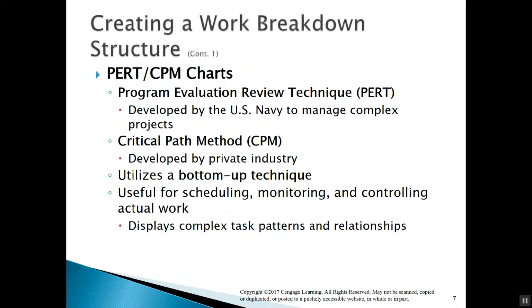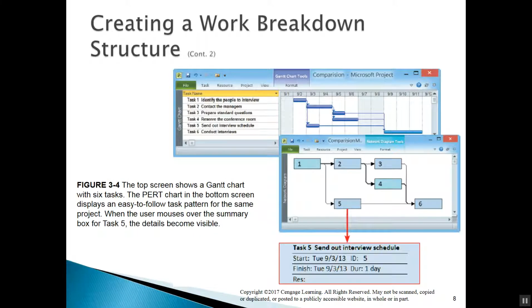Now, things on that critical path, if we shorten the duration of those items, we can shorten the duration of the project as a whole. If it's an item that is not on the critical path, it may have no impact whatsoever to the duration of the entire project if we shorten those items. Okay? So here's the different versions. We've got a Gantt chart. We've got a PERT chart.